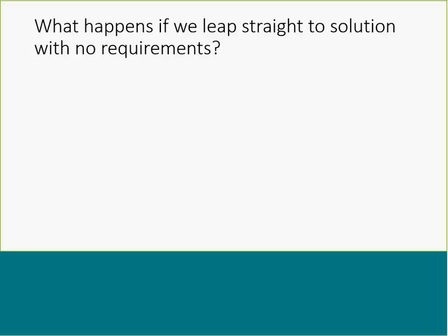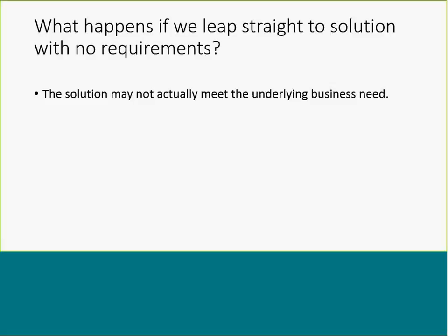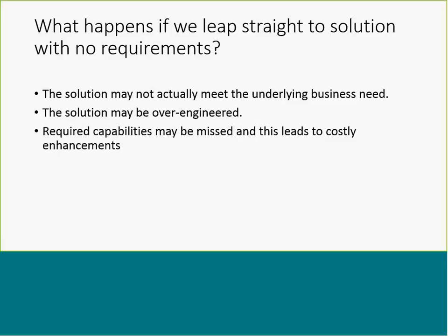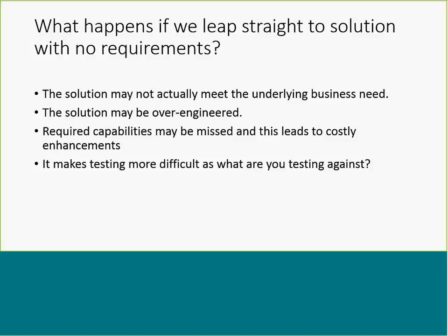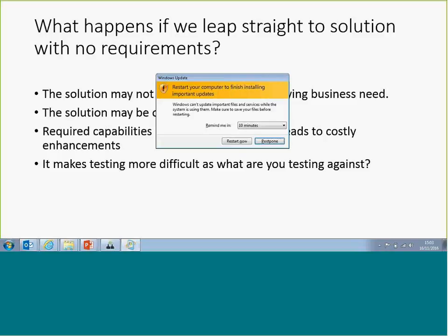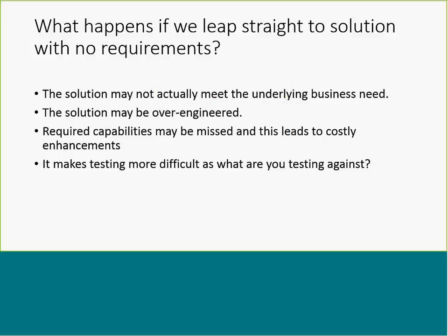You could lead straight to solutions with no requirements. Does the solution actually meet the underlying business needs? Is the solution over-engineered? Developers get their hands on it, they start deciding, oh yes, we can do it this way, and that might not actually be what's needed. Requirements may be missed, and this leads to costly enhancements later on. And it's more difficult because what are you testing against? We had a professional team of testers who were looking to requirements to know how to structure their test plans.